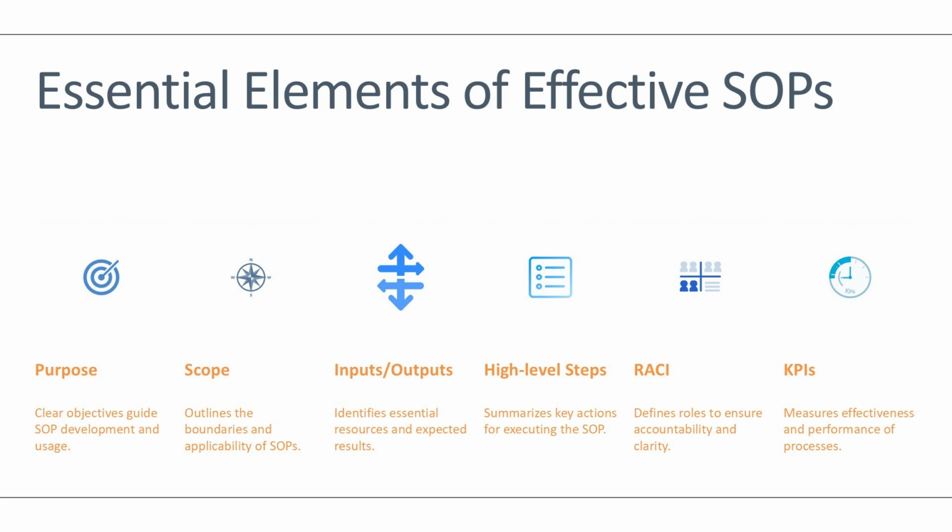The first is purpose, at max 2 lines, describing why this SOP exists. Example could be: to define the standard process for technical submittals to ensure quality and timely approvals. The second is scope. Where does it apply? Whether it is applicable to HO, RO, all the projects, etc.